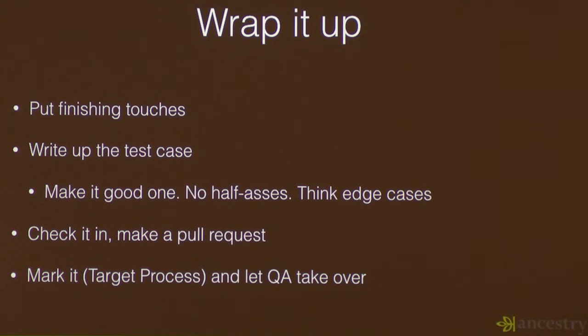And so you want to make sure that, again, you're being honest with your PM. And you have to do this for maybe a quarter. Once everyone does these sprint cycles for a quarter and is sizing them, everyone has the feel of what these numbers mean in terms of effort. So you have to let that sink in for a good quarter or two, even for your PM. And if everyone realizes that these 13-point stories just aren't making it, you just can't get them in that 2-week cycle, then you say, okay, if something's sized to 13, we know it's not going to make it. Let's chop up the story a little bit. Let's work on the layout this time, and then we'll worry about the functionality next time. So it really all depends.